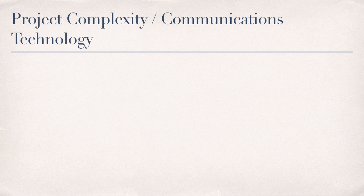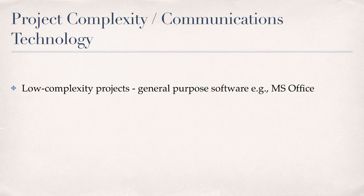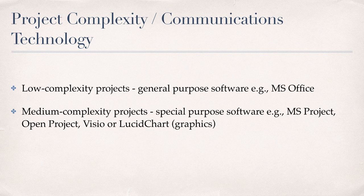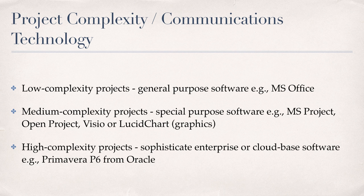Communications technologies may be specified in a project management plan according to organizational standards. Technology selections should also be based on project complexity to ensure appropriateness and alignment with project needs. Low complexity projects might be managed using general purpose word processing and spreadsheet software. Medium complexity projects may need special purpose software such as Microsoft Project, Visio, or Lucidchart, or open source alternatives like Open Project. High complexity projects may need more sophisticated software such as Primavera P6, which is enterprise portfolio management software from Oracle.